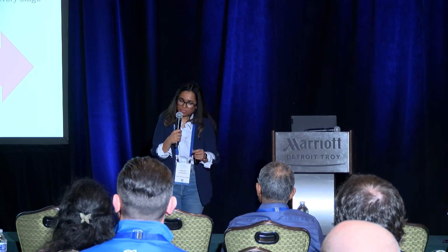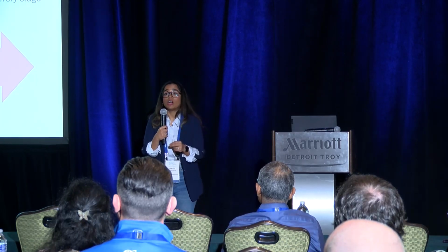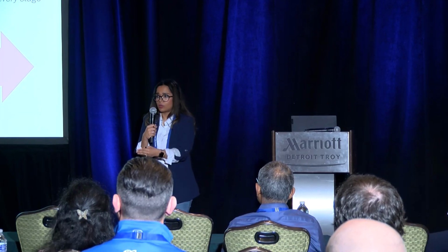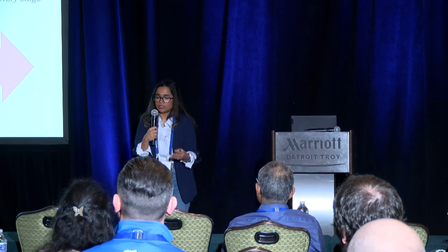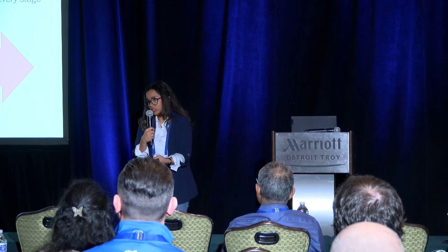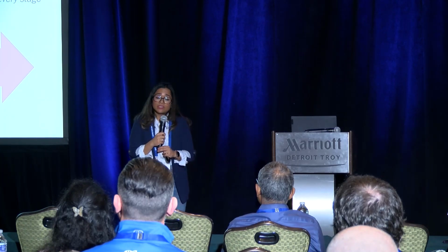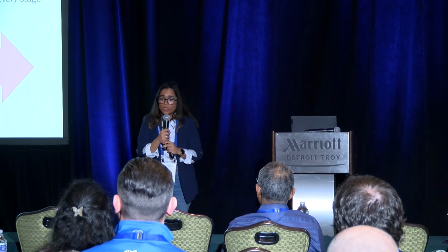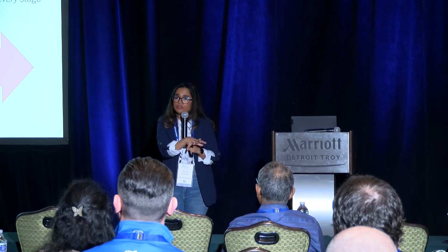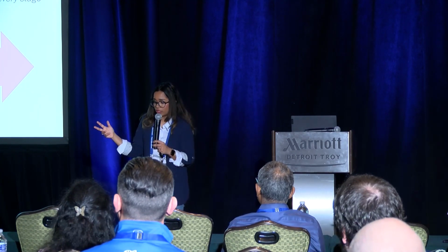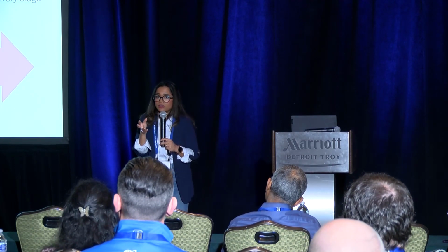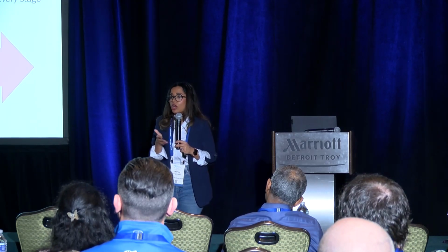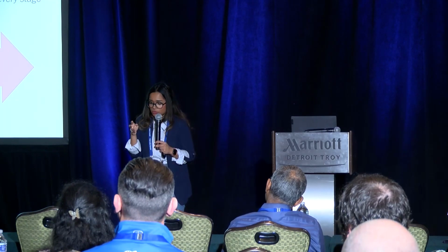But what is easier is to come up with contracts. So when one team is interacting with the other, I have a contract that these are the things that will be done when I hand over things to the other team. It's worked really well. So in the org that we are in, I have 3 different teams that we constantly work with. That's the cloud engineering, which does the infrastructure pieces, and there's data, and then there's analytics engineering. What we came up with was a little bit of a contract, and it's like 3 or 4 simple things that we follow. So every time we build something, this is the start, this is the end, and this is what we will stick to.